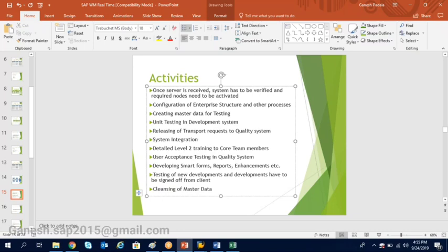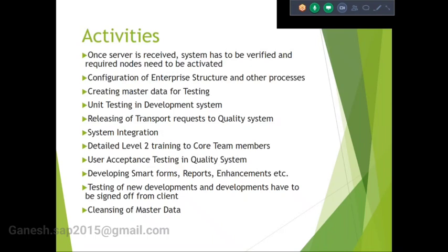So one thing we always need to ensure before UAT is that we perform the training for core team members, because based on that training only can they test thoroughly during UAT, test different scenarios, and highlight all the concerns and issues to us, so that we can understand and fix those issues to make a better system.